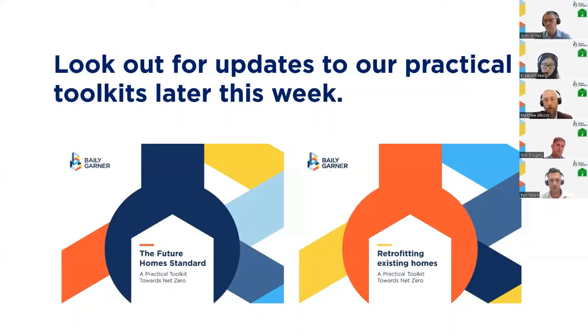I think there are more requirements in terms of survey work to ensure compliance with the PAS 2035 standard. And I think really the starting point is the data you hold, because a lot of problems or a lot of costs can be avoided if there's a good set of data to begin with, and you're not trying to play catch up on stuff that wasn't done in the past, or you can find efficiencies and avoid rework or surveyors having to go out more than once and things like that.